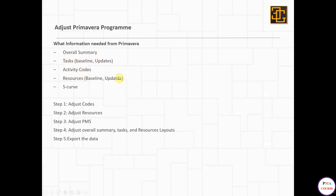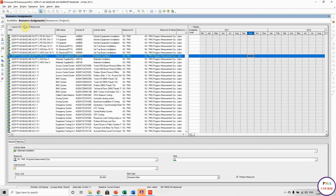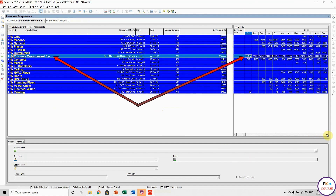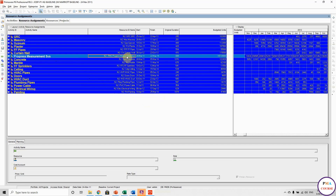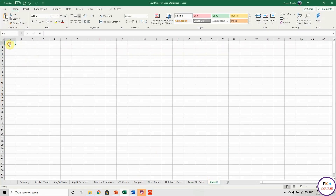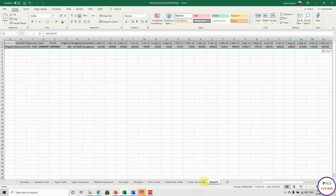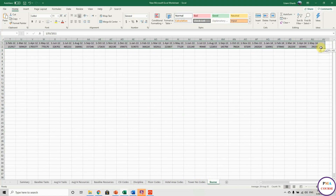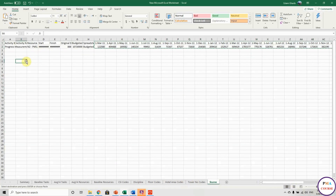So we got the overall summary, we got the tasks, we got the activity codes, resources, and S-curve. We need the S-curve SQL. As I told you, we are using PMS as a weighting system. To get the SQL data, we go to the resource assignment. Let me open this layout — this is the PMS that we have, and this is the distribution of our S-curve. This is the weight distribution. I will take only this line, copy and paste. Everybody knows how to do the S-curve — I'm taking this, making the monthly progress and also doing it for the cumulative, and we'll transfer it to percentage.